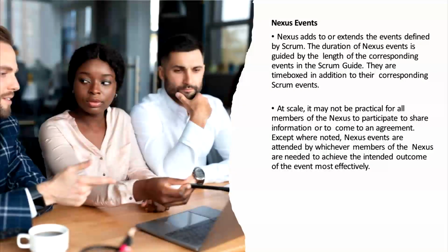Nexus Events. Nexus adds to or extends the events defined by Scrum. The duration of the Nexus events is guided by the length of the corresponding events in the Scrum Guide. They are time-boxed in addition to their corresponding Scrum events.